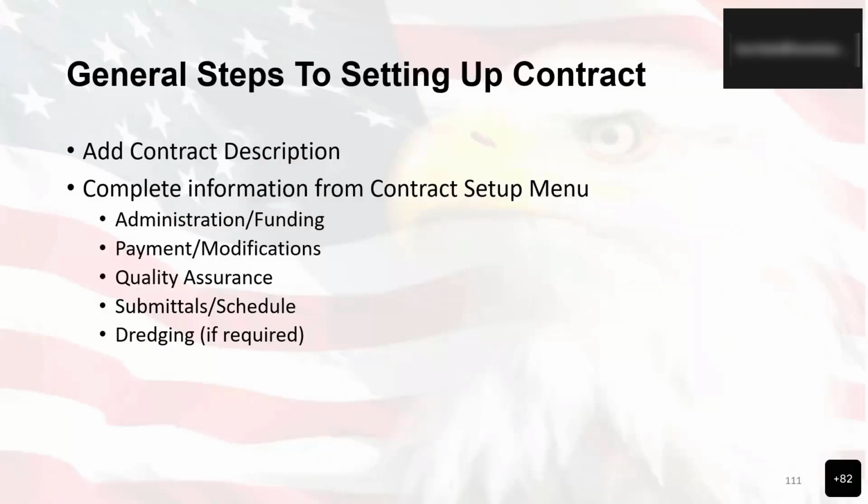So those are the general steps to setting up the contract: adding a contract description, completing information from the contract setup menu, administrative funding, payment modifications, quality assurance, submittals, dredging if required.